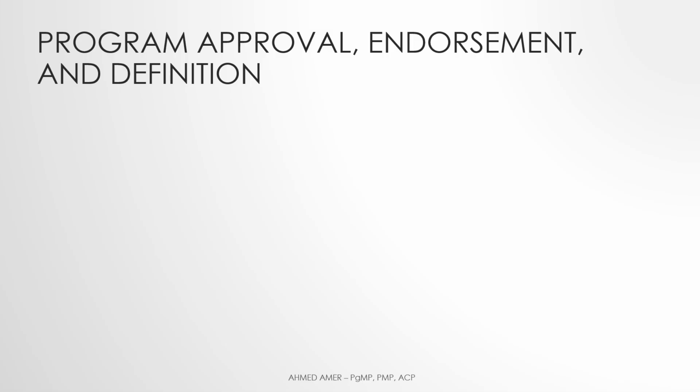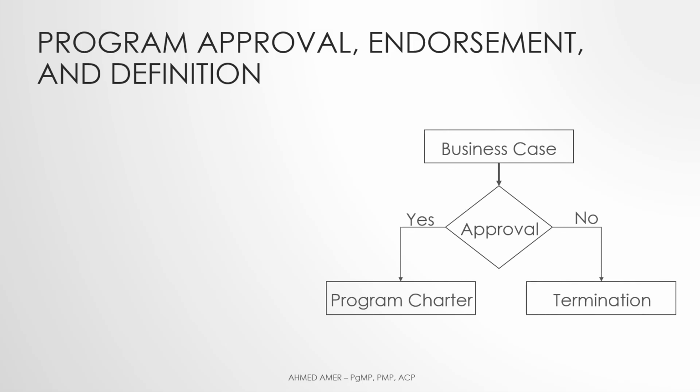Now we come to the third practice: program approval, endorsement, and definition. I think most of you, if not everyone, would agree with me that any program must be approved before its formal start. We discussed this before when we talked about the program's business case. At that time, we made it clear that programs are subject to termination if their business case was not approved by the governance board. Such approvals occur in the program definition phase.